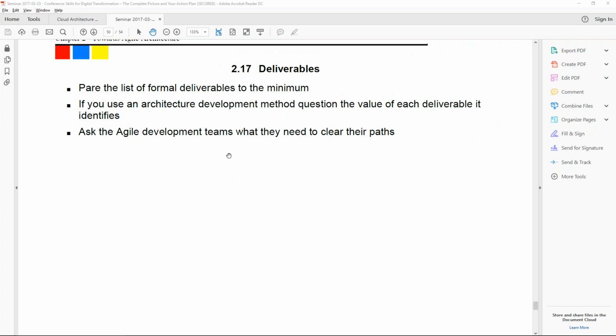Deliverables. Remember, the goal is push the button and deploy the code and automate anything that needs delivered. Agile cares about speed of delivery, speed of cycle incredibly much. If you want something in an Agile world as a deliverable, you have to be able to justify it against the cost to the cycle time, and that's a really big deal.